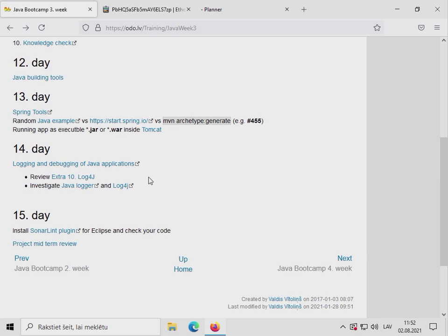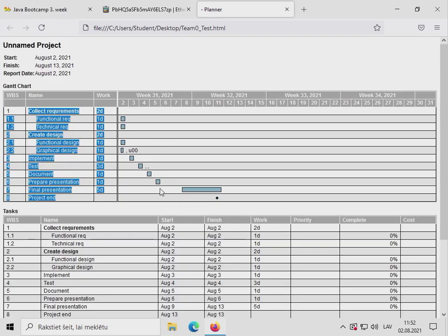And then some unplanned things may happen, but you can't plan for unplanned things. Of course you can. One of the options is you add some placeholders and say this is a task to deal with slipped schedules if something happens. So similarly to coding, if you look at project planning, technically there are different ways of coding or encoding these activities in your particular plan.